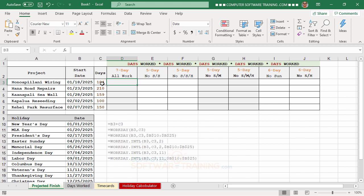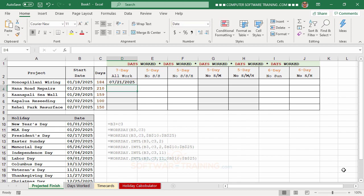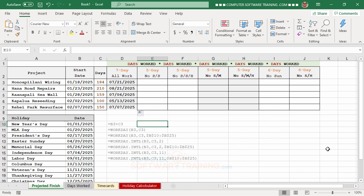The first project starts on January 18th and goes for about 184 days. We need to know what that date would be 184 days from then, assuming we work Monday through Sunday with no days off. The formula simply takes the start date and adds the number of days to it. We type the equal sign, click the start date, hit plus, click the days cell, and press Enter. Then we double-click to copy the formula down.